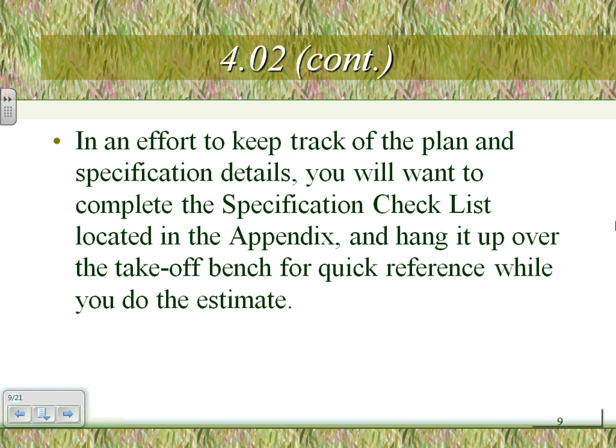Here's a checklist that you need to, before we do the checklist, I want you guys to go to page 51. Can you guys go to 51? There's a sheet there. When you're going through the specifications in page 51, you're going to ask yourself all the questions that you don't have answers to, and you're going to write them on one piece of paper. For example, estimate and bid notes, page 1 of how many? Blueprints, questions, or comments. When you go through the blueprints, you have things that you need, any question, write it down all together. And then the specification questions.